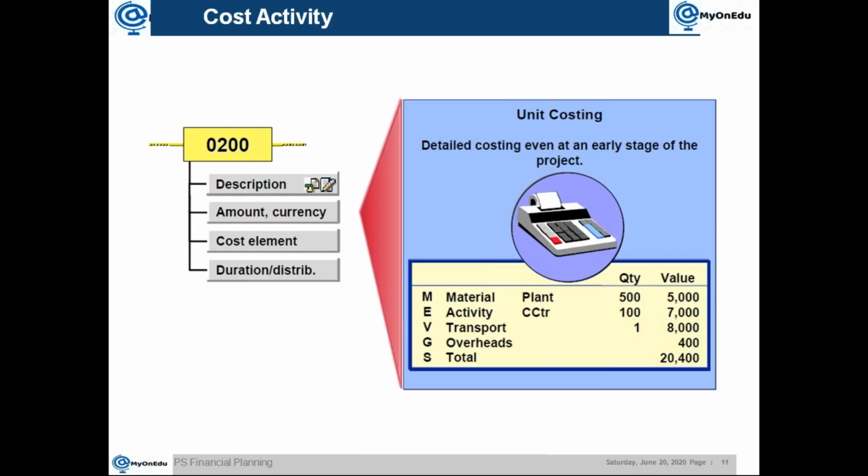One is for when any damage happens to the employee, then you need to pay for them. That is called workman compensation. Similarly, there will be third party compensation. For example, if you are deploying a crane at site, and that crane touches the nearby building and causes some damage, then you need to pay for it. So in each project site, there will be different insurance requirements.